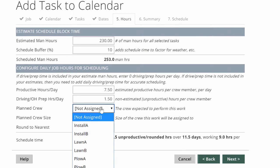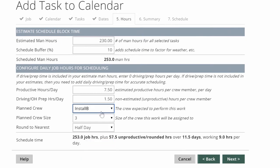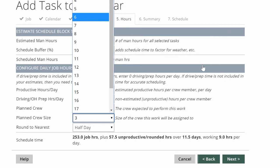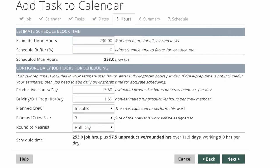Under planned crew, I can pick installation B because I know that they're free. It'll default them to a crew size of three because that's how I've set them up, but I could also schedule a five-man crew or a two-man crew depending on the specific job. I'm going to round it to the nearest half day.